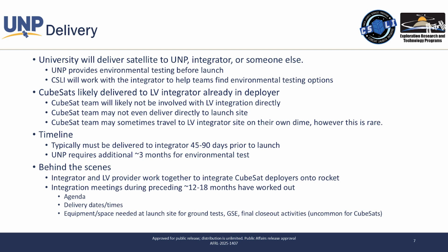A lot of times the integrator will have you deliver the spacecraft to their facility, so then they can deliver it to the dispenser and then deliver that dispenser over to the launch vehicle for integration. Very rarely is the CubeSat team allowed to be directly involved in launch vehicle integration. There are some cases where it's happened, but very rare. And very rarely will the CubeSat team deliver directly to the launch site.